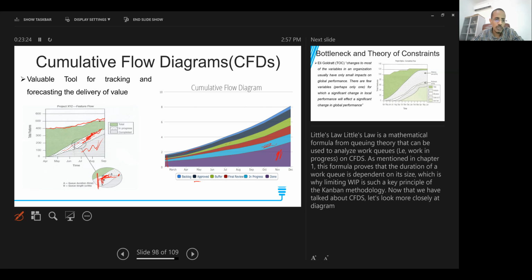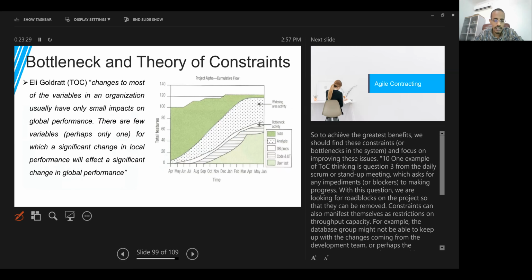So instead of that, we can use the cumulative flow diagram to identify the bottlenecks. And this is what is shown here in this example. Here we can divide this diagram based on the different tasks or different departments or different business units in the project. And then here, for example, we have these items ready to be executed. Let us say this is design, and here we have development, and here we have coding, and here finished. This is the finished item.